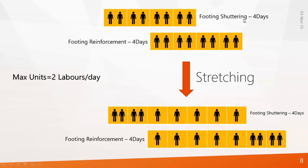The next technique is stretching. Footing shuttering of four days and footing reinforcement of four days — here also you have only two laborers. On the third day, again you need more resources. Stretching means you are simply reducing the labor force and increasing the duration of the activity. On the first day, two laborers were working. But when it reaches the third day, one labor works on footing shuttering and another labor works on footing reinforcement. When the labor force decreases, the activity duration automatically increases. This is what stretching means — the activity stretches because the labor force is less.